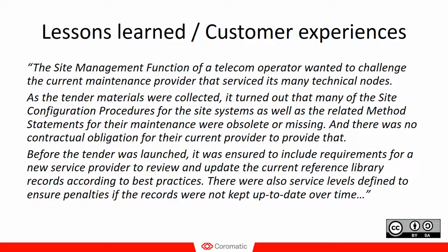it also turned out that when they looked at the site configuration procedures and the method statements for how to maintain these, it turned out that a lot of them were missing, and some of them were there, but they were obsolete. So they referred to old systems that have been replaced, or they were not complete. So they challenged their provider and asked why that wasn't up to date and in place, and the supplier simply stated that there was no contractual obligation for them to provide those things. That was the site owner's responsibility.